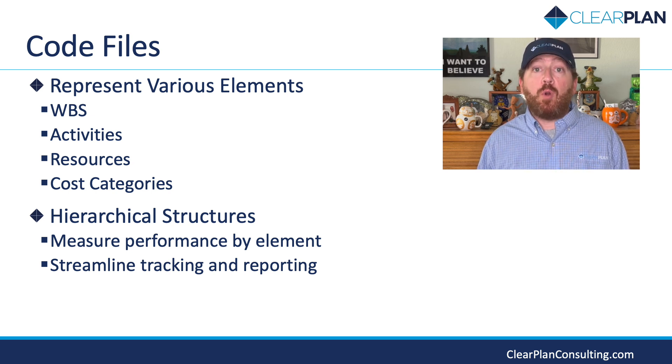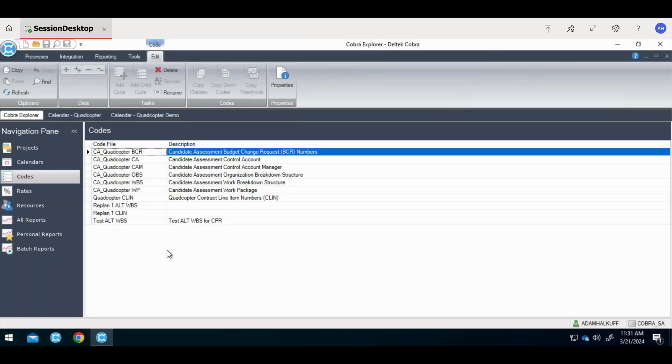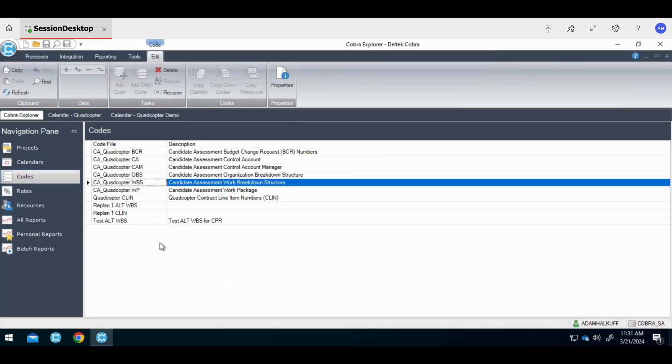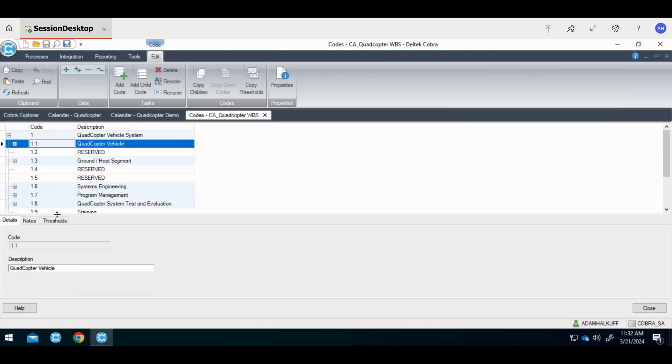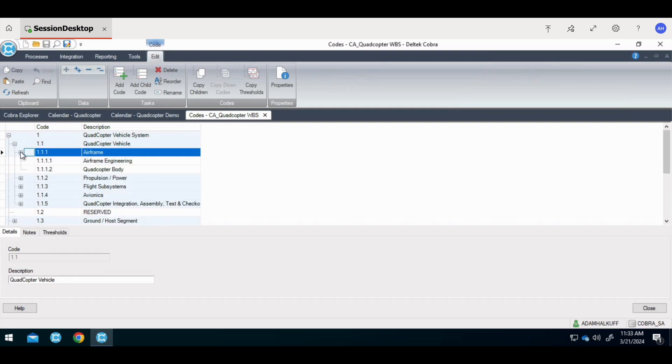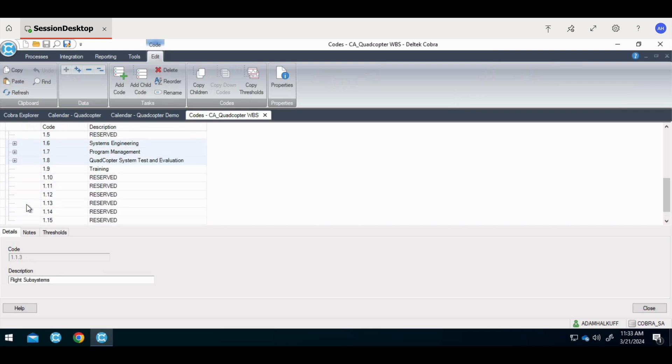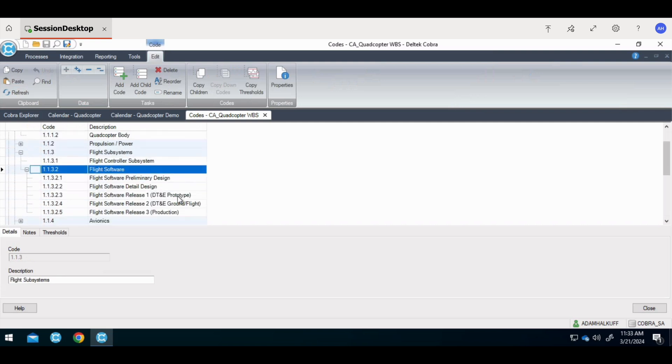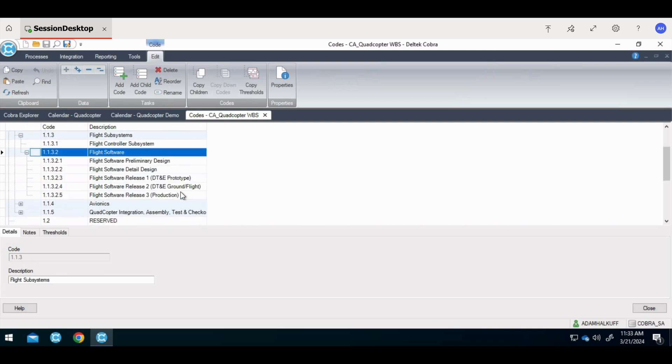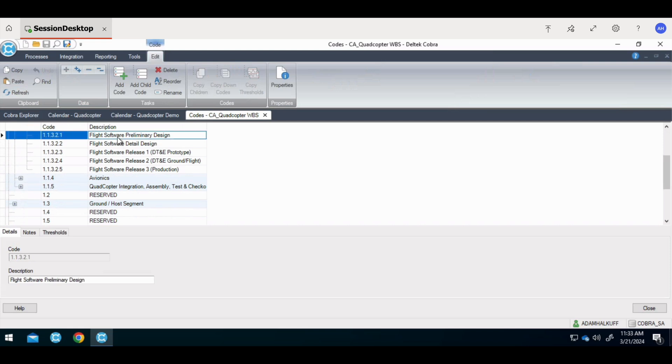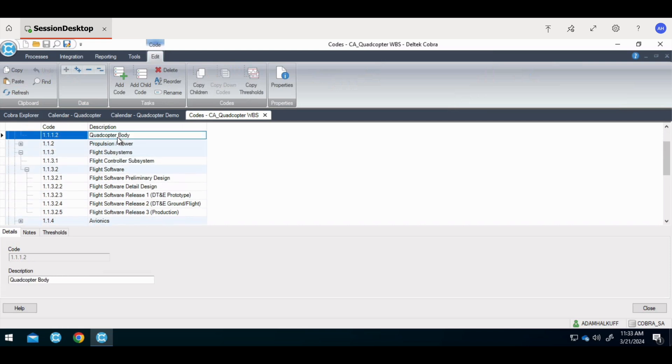Code files are the building blocks of every project. The first step in building an EV program in Cobra is to set up the work breakdown structure. Each program will have different code files. The code file each program uses will depend on how the Cobra program is set up and its reporting requirements. The WBS code file is set up with a hierarchical structure. Our code structure goes from 1 to 1-1, and then we can even go further into 1-1-3-1, 1-1-3-2, and 1-1-3-2-1. Each program, each project will be set up according to the structure of how the customer requests. This structure allows reporting to be rolled up from the lowest level of 1-1-3-2-1 to 1-1-3-2, 1-1-3, 1-1, and then to the top level of 1.